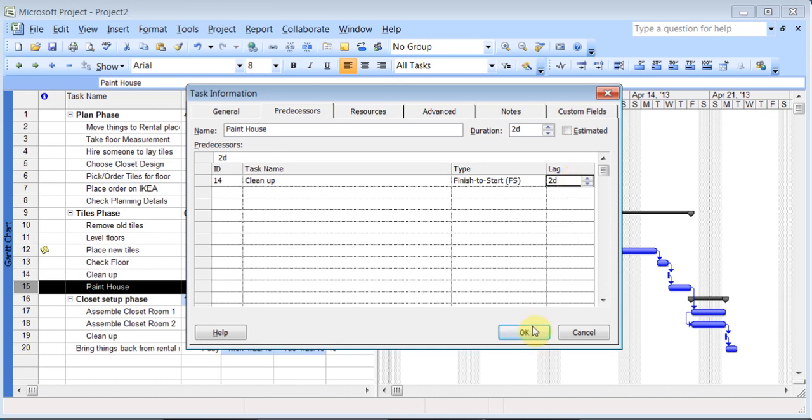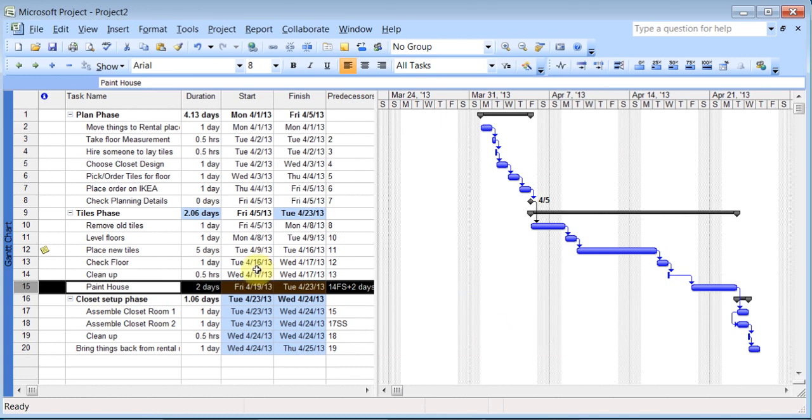So in certain cases you may need it. When you do that, you see these numbers have changed because I've added the lag days. Things got pushed behind, and the Gantt project already adapted, and you can see how the colors in blue show me the changes. So that's another option to use whenever you need it, if certain jobs require some extra space between each other.